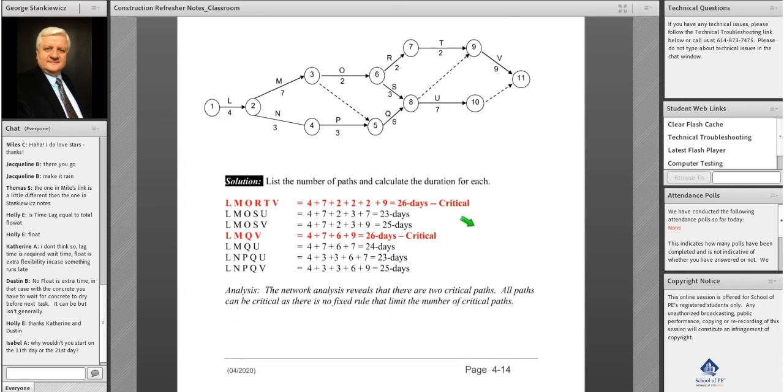There's no shortcut to this. You have to do what we just did in the previous example: identify all the paths, calculate the duration for each of the paths, and then find the critical path, which is the longest path through the network. So you see that we have seven paths.